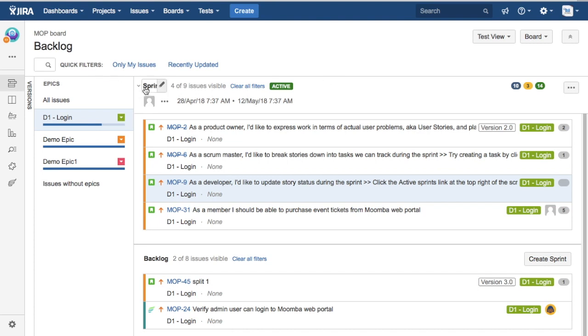In an active sprint, if you're adding or removing any issue, then the scope gets impacted because you have already planned your sprint prior and you have already started the sprint. So in between the sprint, if you're adding or removing any of the tasks or stories, then the actual estimation that you have done prior to starting the sprint might get impacted.